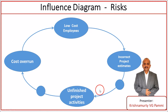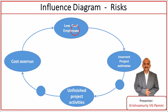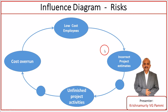It is a chain — low-cost employees producing incorrect project estimates, leading to unfinished project activities, leading to cost overrun, and again you want to position low-cost employees on the project. The moment you see all these risks in a diagrammatic, graphical way, you know what is coming first, what is the cause, what is the effect, how the cause and effect are interrelated, and how they are contributing to the overall project outcomes.